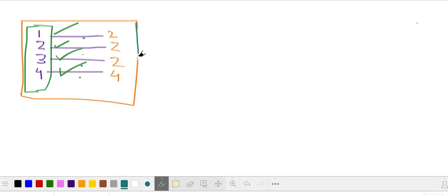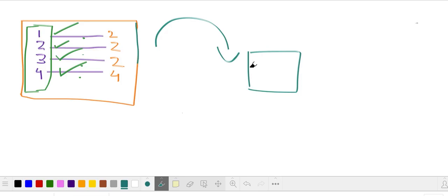Whatever information we get, we're going to put into the PMIS software. We're going to put the numbering, the activities, the duration of these activities, the name of who's going to do each particular activity, the due date and everything to track it down. One of the very famous PMIS software is Jira.